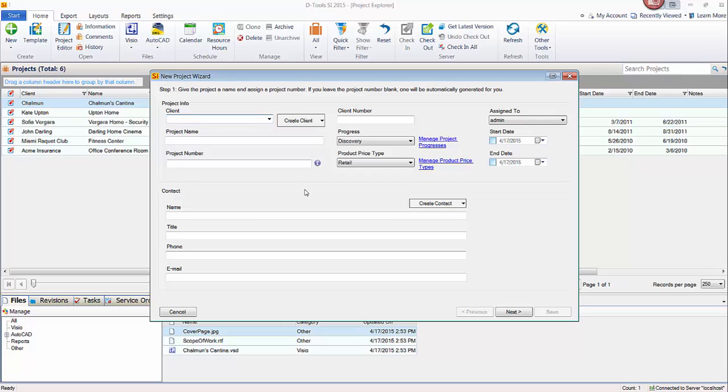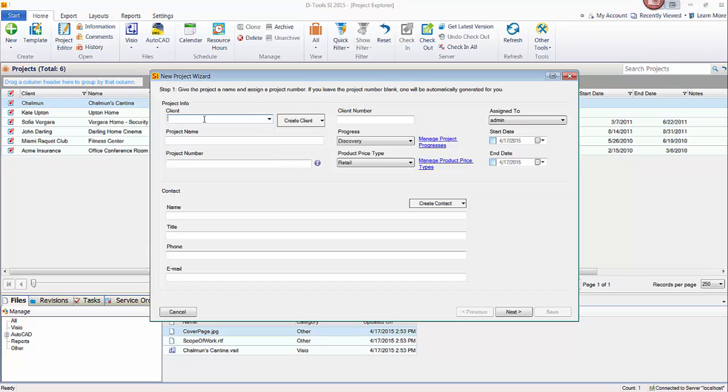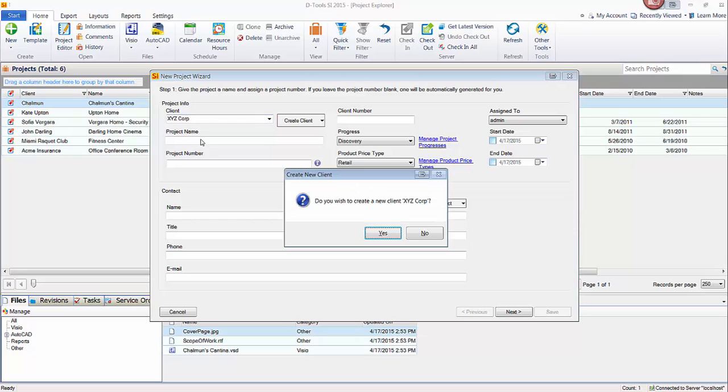At a minimum, you have to fill in a client name and a project name in order to create a project file. So you can use the dropdown to select an existing client or type in a new name here. Say it's XYZ Corp is the client. When you tab out of this box or click out of it, you'll be prompted to create the client.